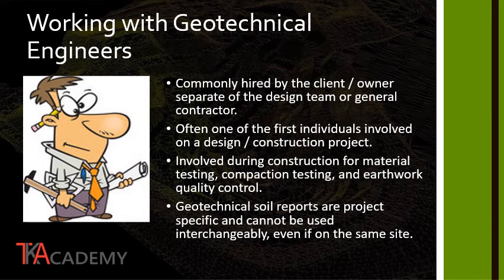It should be evident that the geotechnical engineer forms a critical part of the project team. Although the design team relies on information provided by the geotechnical engineer, they are typically hired by the client or owner separate from the design team or general contractor. This is partially because the owner is responsible for providing the design team with all the information regarding the project site. Because the soils report provides vital information going into the development of design, the geotechnical engineer is often one of the first individuals that is involved on a design and construction project.